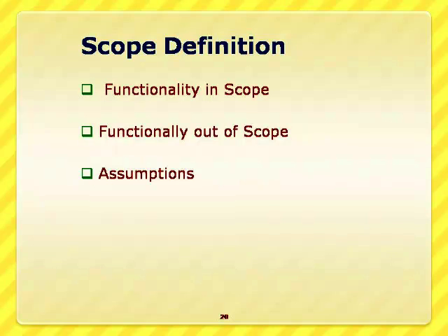Functionality in scope gives clarity for all the stakeholders. We have considered only these issues to be built in the first phase. Some of the issues we have deferred because of these reasons. This issue is not accounted for in the data warehouse build because it is going to have more cost or some of the data is not clear. So what is functionality in scope, what is functionality out of scope? If I clearly define the scope definition document, that will guide all the people to implement smoothly.